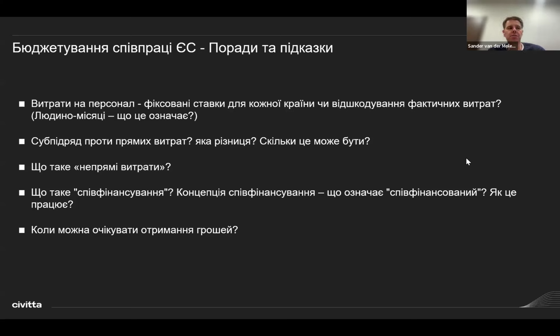And the recommendation is don't overdo it with the amount of subcontracting. Try to keep it, rule of thumb, around maximum 30%. And maybe you have your own preference to keep most of the project budgets in-house to do it yourself because it actually would pay the salaries of your own people, or maybe it allows you to expand your organization and hire on project basis or permanent basis more people with certain expertise. This is up to you to choose.